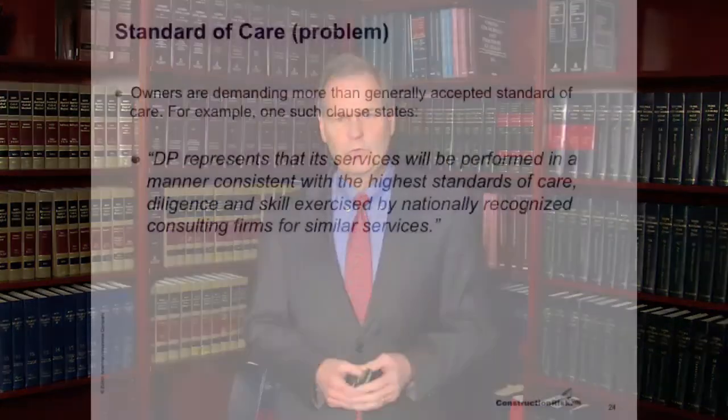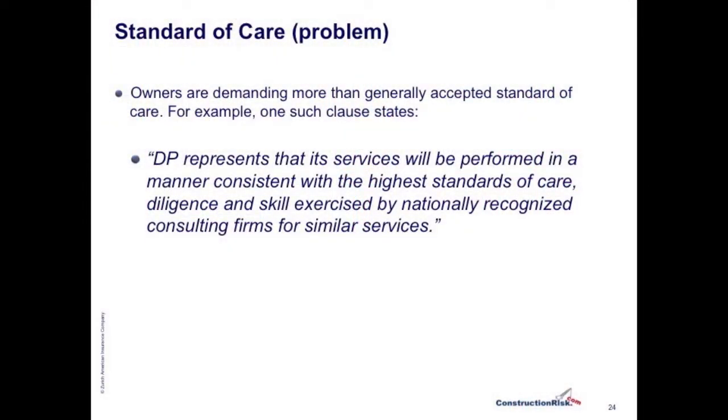For example, a clause that I've seen in a couple contracts reads as follows, quote, "Design professional represents that its services will be performed in a manner consistent with the highest standards of care, diligence, and skill exercised by a nationally recognized consulting firm for similar services." Close quote. Now, a clause like that one that requires a highest standard of care goes beyond what a court